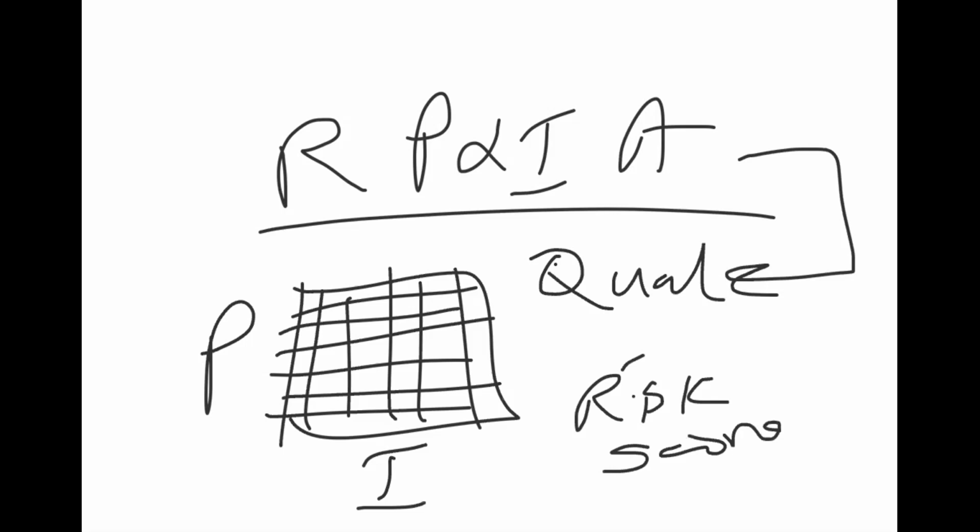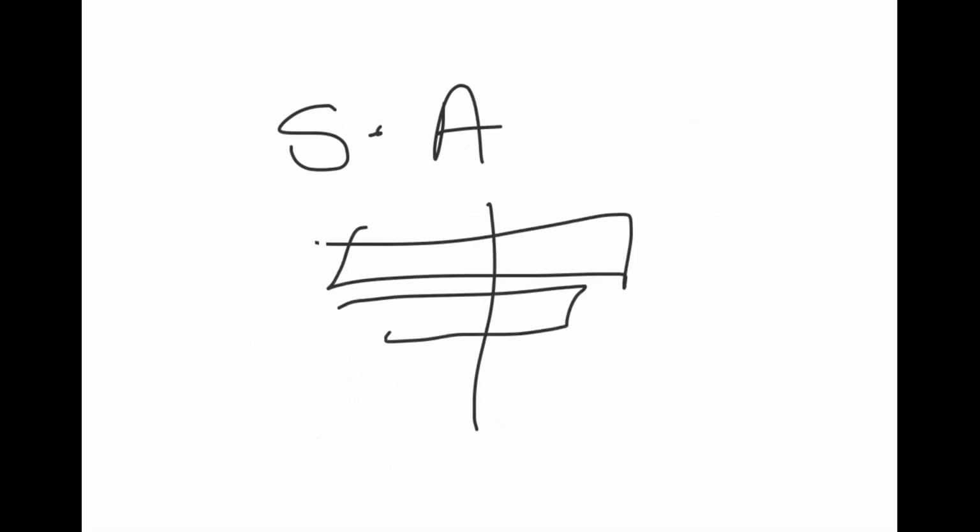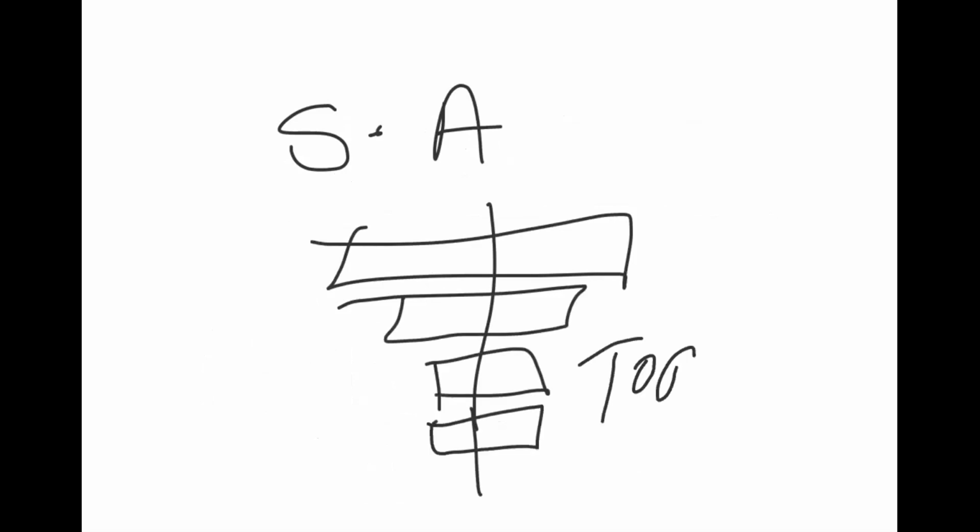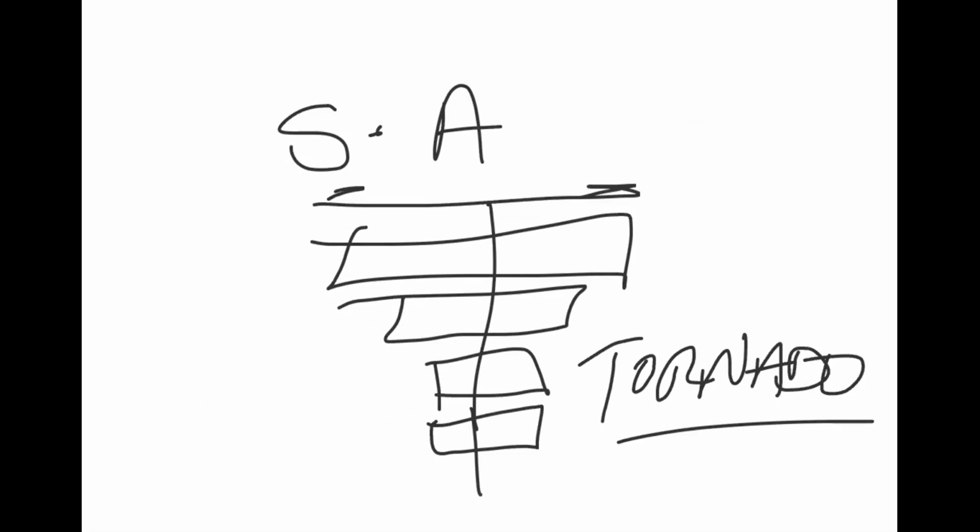Okay? Good. The next one we've got here is sensitivity analysis. And you know what you need to think about? This thing, the tornado diagram. Again, go to Jimmy's page, check it out, and get to a good understanding of what it is. The wider the band, the more sensitive the risk. Enough said. Simulation. What is simulation?